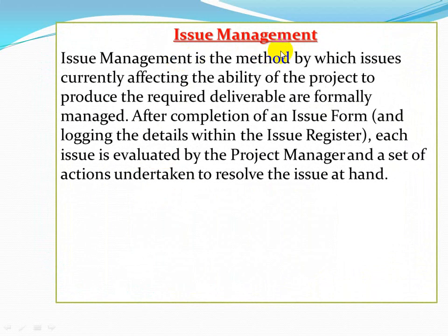इसके बाद है इशू मैनेजमेंट. ये बहुत ही इम्पोर्टेंट टॉपिक है. Issue management is the method by which issues currently affecting the ability of the project to produce the required deliverables are formally managed. After completion of an issue form and logging the detail within the issue register, each issue is evaluated by the project manager and a set of actions undertaken to resolve the issue at hand.